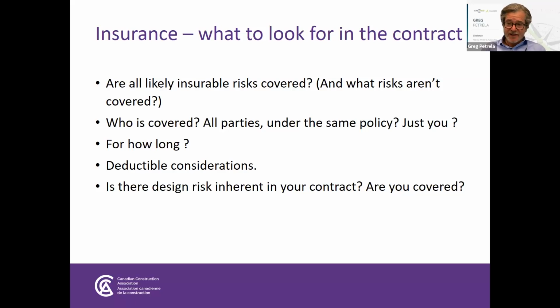And very often it's the prime contractor holding the bag. Sometimes it's passed on to the subcontractors. Sometimes the owner takes that responsibility in certain construction management contracts. So be very careful, because those deductibles get amended, and that can impact the risk of the prime contractor and the subs, who are usually responsible for damage if they cause damage on a project site.